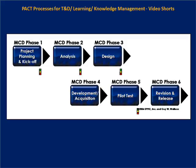If training is not an appropriate solution, then the project can stop right then and there. You'll see the upside down traffic light there under the analysis box — that's the project steering team gate review meeting where the analysis data, results, and recommendations are made. Although our bias in these projects during gate review meetings is to go rather than stop, hence the upside down traffic light, if it's appropriate to stop the project and go do fixes to the process or the enabling asset provisioning systems rather than just do training, then stop the training project.